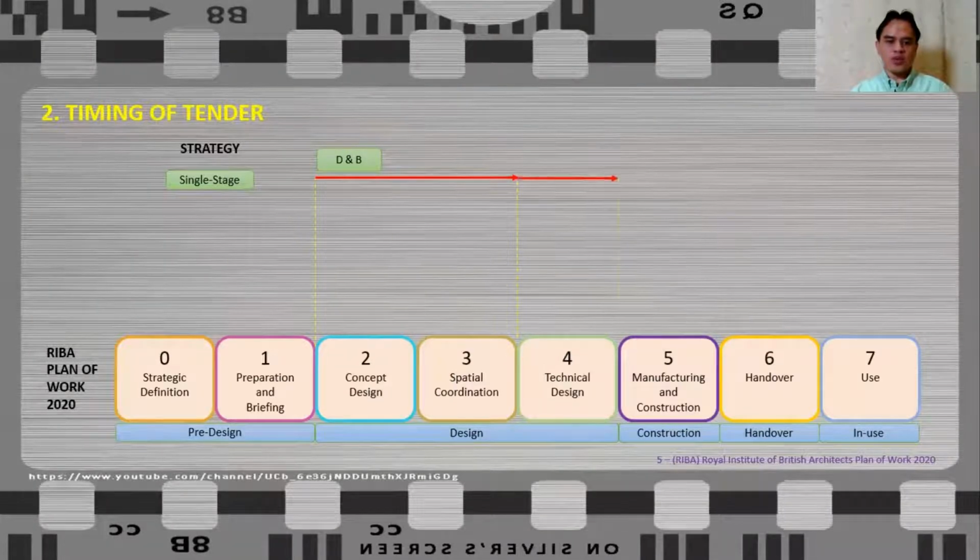While from the period where technical design is about to start up to the period where full technical design is available, traditional tender is usually carried out. Prior to completion of technical design, you can have a single-stage traditional tender with contractor's design portion. The level of contractor's design requirement will be lesser until such time that you can have a full traditional single-stage tender when the technical details is fully completed.